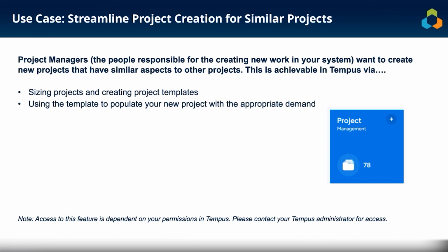In today's use case video, I am going to be talking through the ability to streamline the creation of projects for similar projects. So the specific use case here is project managers and/or whoever is typically responsible for creating new projects within Tempus. They want to create those projects that have similar aspects to other projects. So this is achievable in Tempus by, first off, sizing your projects and then creating these project templates, and then using those templates to populate new project information with the appropriate demand.